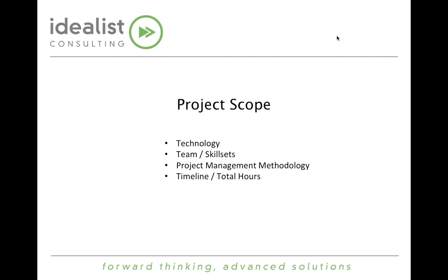It's important to note that this project had some very specific requirements related to geolocation, mapping of tree sites, this custom Visualforce that I mentioned. That really represented the bulk of the project hours. So the scope of a Salesforce1 deployment is really going to vary based on your organization's needs and how much customization, or how little customization, that you want.